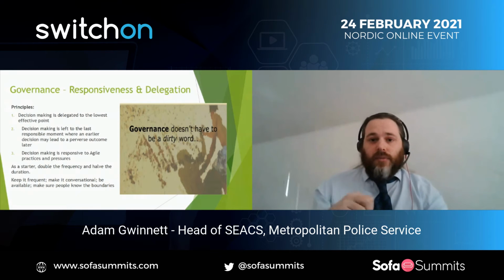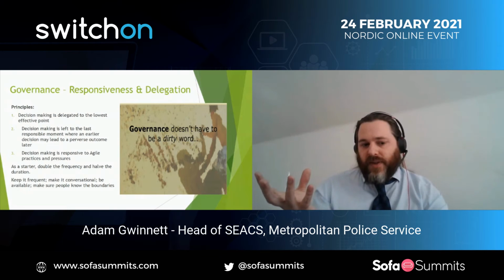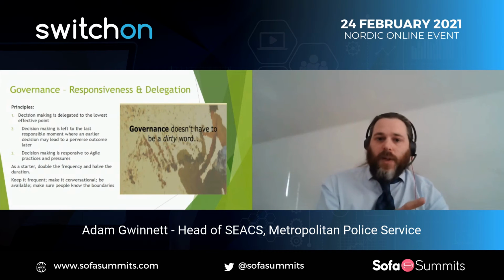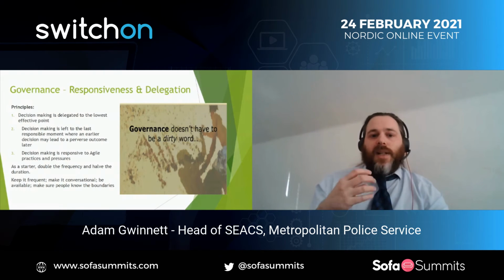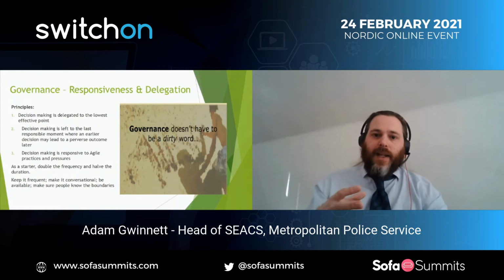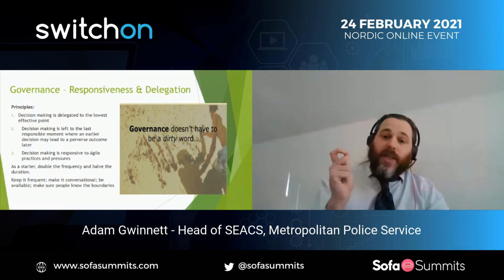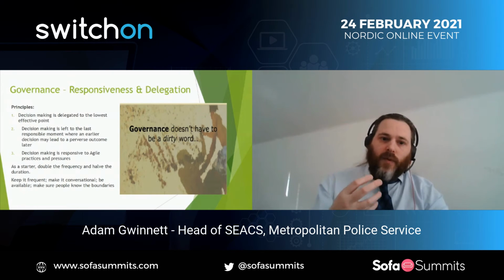And halve the duration. So we went from having a 90-minute meeting every month, as an example, to a 45-minute meeting every 2 weeks. And effectively, that means that nobody's ever waiting long for feedback or for a decision. And because the sessions are shorter, they also have to be far more focused in terms of what they come to you with and ask.